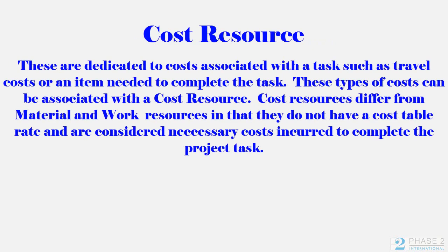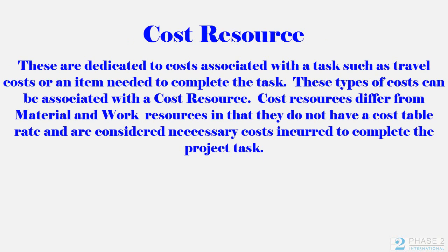Cost Resources are dedicated to costs associated with a task, such as travel costs, or an item needed to complete the task. These types of costs can be associated with a cost resource. Cost Resources differ from material and work resources in that they do not have a cost table rate, and are considered necessary costs incurred to complete the project task.